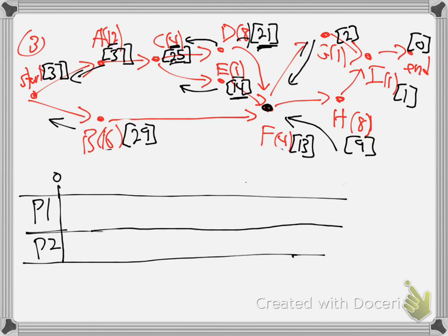And, all right, processor 1. Which job are we going to start off with? How do you know whether it's A or B? Right, processor 1, at the start, first employee wants a job. Is he going to get job A or job B? A. How do you know it's A? Because the bracket number is higher. Yeah, the higher bracket number.